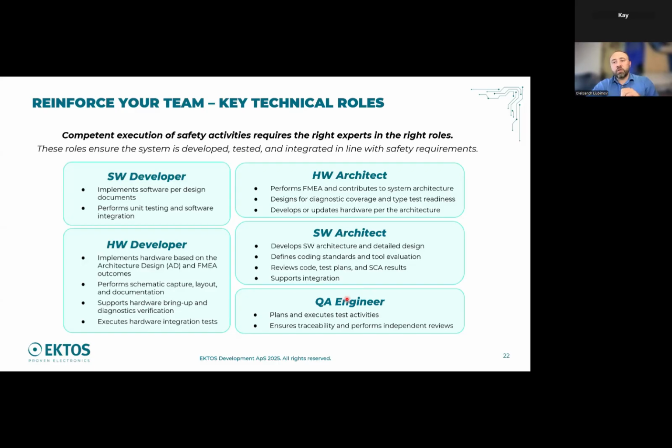It's too late if the assessor comes in and then you say, oh, by the way, there is only Mr. Joan who did everything from requirements to the pre-compliance checking. That wouldn't fly. But if you have a well described personnel plan with a good justification of why you would be able to address the requirements with fewer people than the roles described, then it's fully fine.